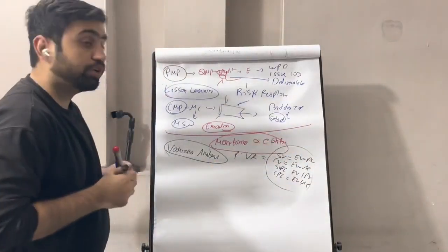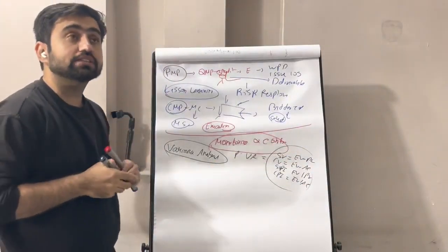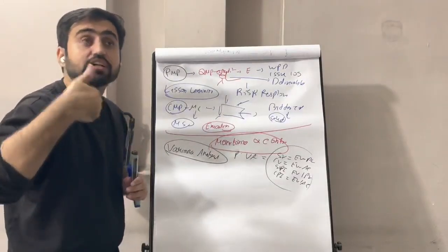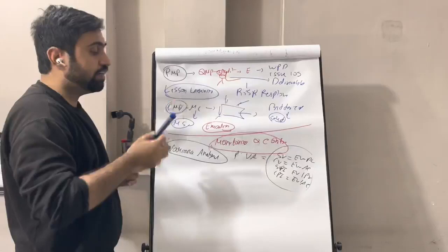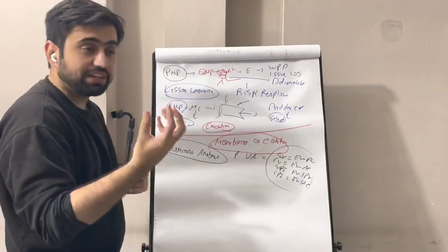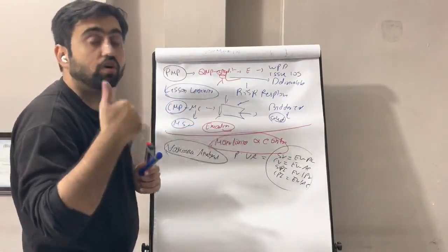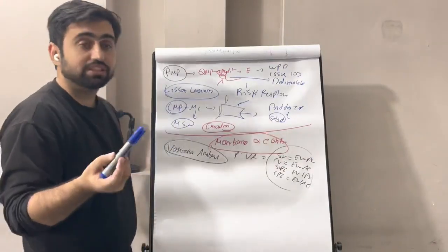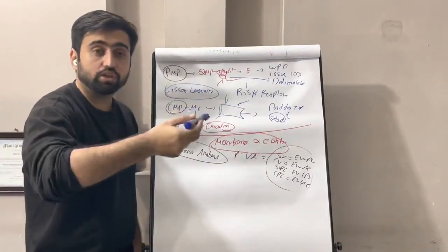We also monitor risk. We review the risk and do the risk audit. We identify new risks and see what the residual risk, accepted risk, or secondary risk is as a result of the responses we have implemented. We are also releasing the resources as the project is going on.